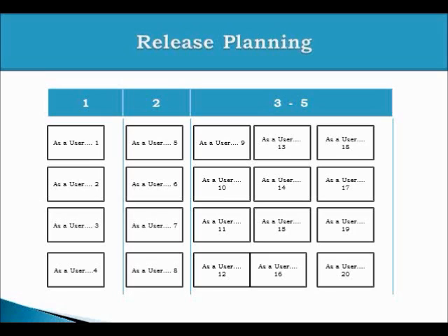Why do we do it? Because in Agile, we do planning at the last responsible moment. It's not necessary to identify which story is getting developed in iteration number 5, because things will change. Things are going to change. So only plan the stories for the initial 2 iterations. The rest of the stories can remain as a bucket, as a packet, and they get scheduled in the 3rd, 4th, or 5th iteration. The stories which are getting mapped to the initial iteration should also be sliced well.